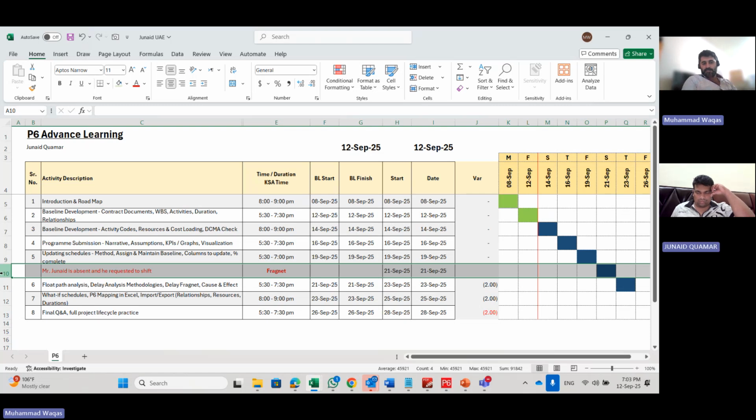I will not introduce this new shift or new thing. So in advance, you are telling the client that if you introduce this thing, there will be consequences. And by reading those consequences, maybe he will change his mind. He will say, okay, I will not do it now. So you are also giving him an opportunity. Therefore, it's very important to tell in advance so that he can change his mind.